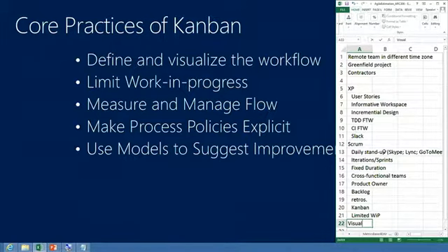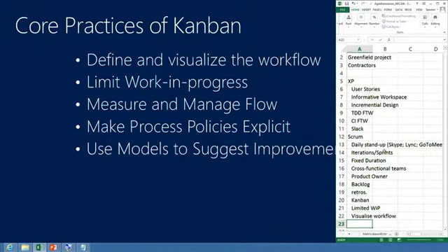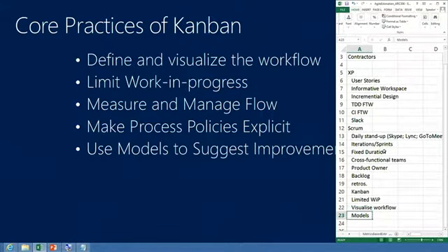Yep. And we're agreeing, by limiting the work in progress, the only benefit you get from limiting the work in progress is identifying bottlenecks and then changing your process. So then I'm suggesting, so I don't want to force you, but someone did say all, is then use the models, which is Kaizen, which we already wrote. So just say Kaizen. The last bullet, we can just shorten to Kaizen.